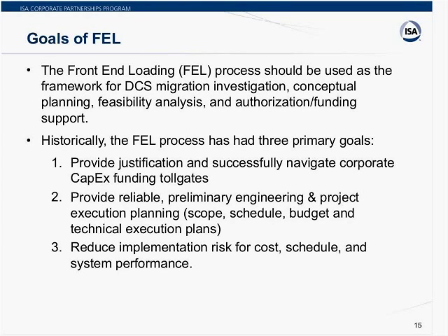Traditionally, the FEL process has 3 goals. One seems obvious, but should be stated: to provide the justification and help successfully navigate the corporate CapEx, capital funding approvals. Oftentimes, and this happens fairly often in our experience, this is where a lot of projects fail, or at least they get delayed year after year, because there's not sufficient justification for the project. And oftentimes that can be because the front-end loading is not performed to an adequate level, and the backup material, if you will, is not there.